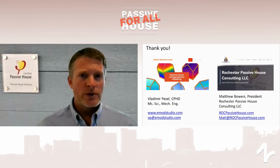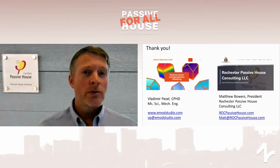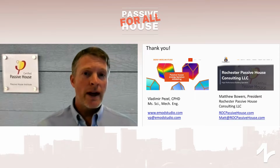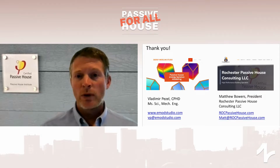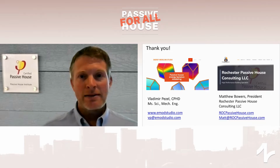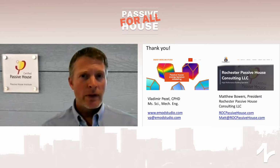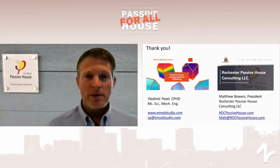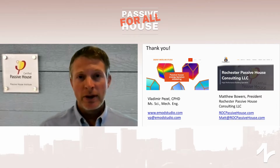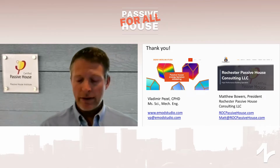And then also, I love what you said about certification. For those of you who don't know, the certifier should be hired by the building owner, not by the designer. That changes the interest a little bit, as the certifier is working for the owner, not working for the designer. So it's that extra set of quality assurance eyes on your project. And for those of you who haven't dived into PHPP yet, there are 10,000 plus entries in PHPP, and if you get one assumption wrong, you miss a decimal somewhere, that can lead to some problems as well. So it's certainly a quality assurance thing.